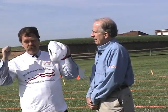Okay, Owen. Over a period of about 14 years, we've figured out a formula to make this happen. As long as we're going to have more than 1,000 participants, we can go with a format that takes one color of cardboard for one child, and we can put together a mosaic that forms a flag. If we have fewer than 1,000, we really have to take a big painting of a flag, cut it up into the right number of pieces to be able to make a living flag. But for a big one like this, we can go one color cardboard for one child. All right. Much easier to imagine.